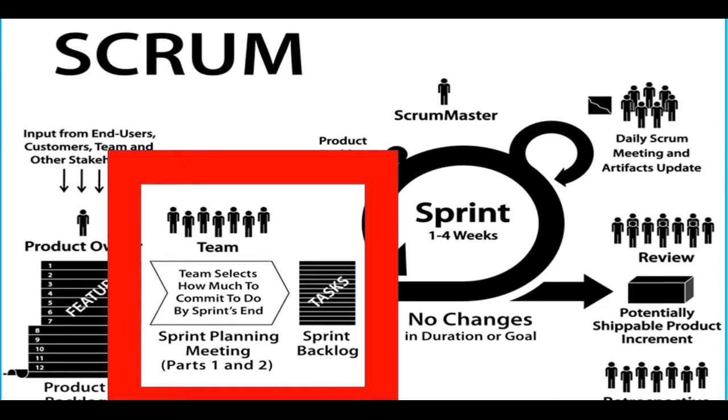In sprint planning 1, normally all the team members will sit together as a team, and the product owner will explain each requirement from the top based on the product backlog which is already available. Once the team members understand the requirements, they will go ahead and do the estimation. Here, each and every team member is going to be involved in the estimation process. Once the finalized estimation number comes, that will be updated in JIRA, and then it will be moved to the sprint backlog. So let's directly see how it is going to happen in the tool.